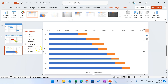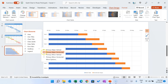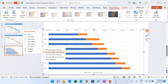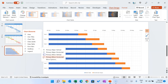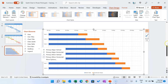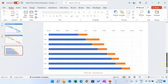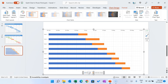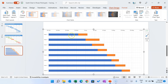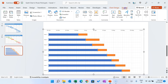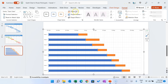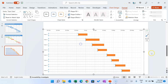Click the plus button for chart elements, go to Gridlines, and check Major Gridlines. You can also add minor gridlines. Remove the legend by selecting it and pressing Delete. The blue color represents the start date — select it, go to Format, and set the fill to No Fill so it becomes invisible.